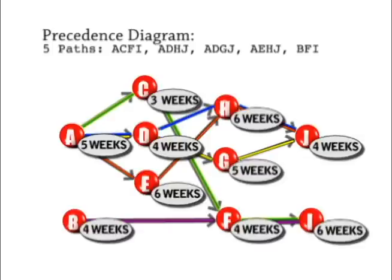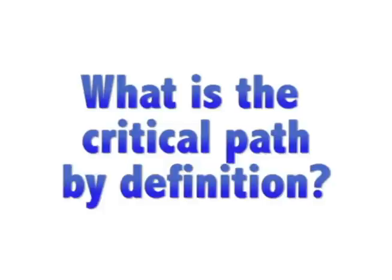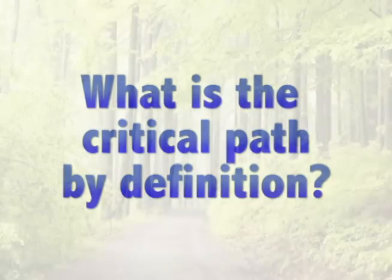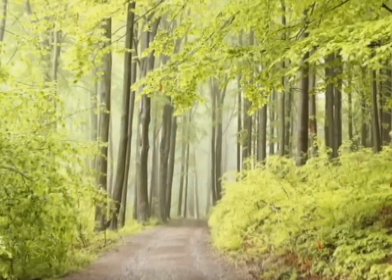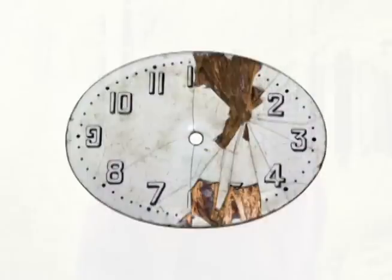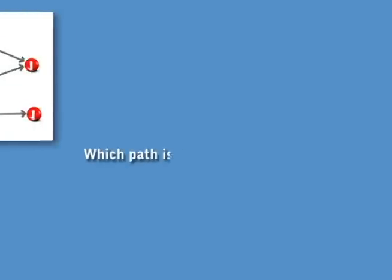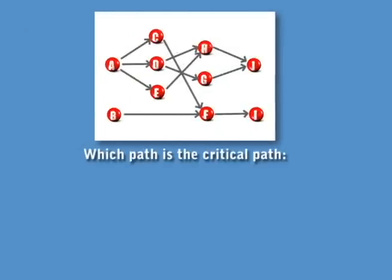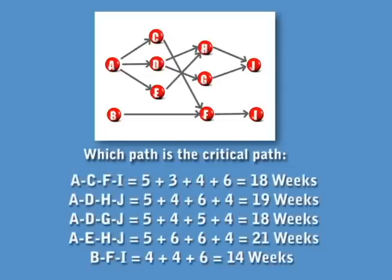We can go through and use the information for each one of these activities to identify what the critical path is. The critical path is that path that, if you had any delays on it, it would delay the entire project. That means there is zero slack time associated with the critical path. We can add up each one of the activity times and we see that for our first path it's 18 weeks, second 19, third 18, fourth 21, and fifth is 14.